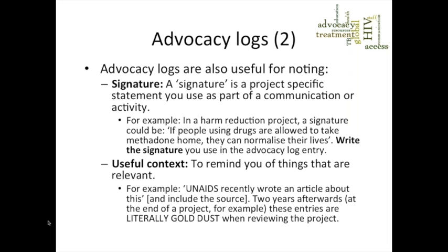Advocacy logs are also useful for noting down signatures, a particular message you might have used if you're talking to a stakeholder, a signature to the project. If it's a harm reduction project, for example, the example I've given here is rights to take methadone home. And also useful context on a certain day: if, say, UNAIDS releases something that is relevant to your project, you note it down. Then, a year or 2 years in the future, when the project has been evaluated, knowing that that UNAIDS report came out at the same time gives you interesting ways to discuss why advocacy might have worked or why it might not have worked.